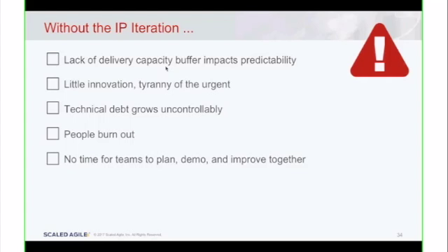So let's just leave a 2-week buffer where we're going to do innovation. We're also going to do things like tie up loose ends that didn't get tied up within the iterations where the work was planned. Because if we don't do that, we're going to have this technical debt that keeps rolling over from one PI to the next. It kind of snowballs, right? So there's many reasons why we want to have this innovation and planning iteration within every PI.